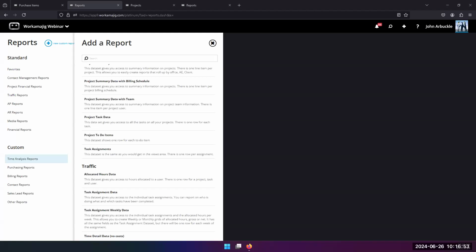We'll accept that. Again, it's up to you guys to set what your percentage of discrepancy is before it goes back to the account manager or project manager, or you talk to the vendor about it. But hopefully, if it's more, then it's definitely a stop. That's a definite red flag. Why is it more than my order? And it might just be you forgot to put in shipping or something like that, or you didn't include taxes.